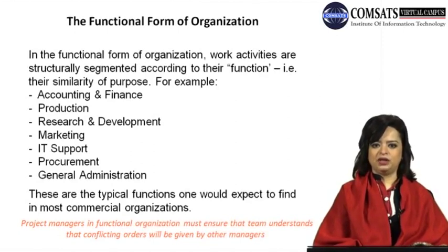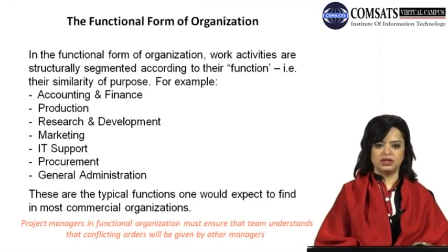5 weeks pass and you tend to hear the same justification that each one of them is busy with the work that they're already doing. These are the hardships of being in a functional organization and trying to run projects in a functional organization. The creation of the lab that was intended to be done in 6 weeks would ultimately be done, but it would now take maybe 8 or 10 weeks. And that also after you're complaining to your sponsors that nobody is ready to do the work in the allocated time that you have assigned them.